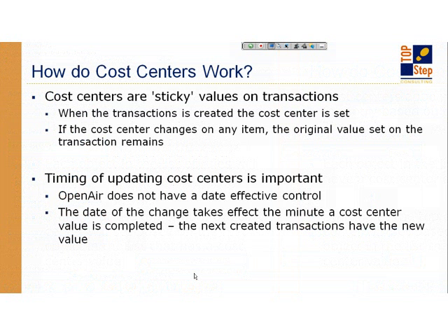Now the good thing about cost centers is they're sticky values, which means the minute that a transaction is saved, a time entry is saved, or an expense receipt is saved, that cost center gets stamped onto it. Okay, so that's great for reporting because even if you change a cost center on a task or a project, it won't impact history because the sticky field is left on the transactions from history. Okay. But the bad news is it's a sticky field, so there's good and bad to it.